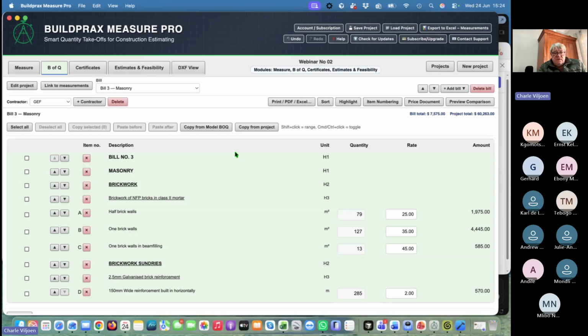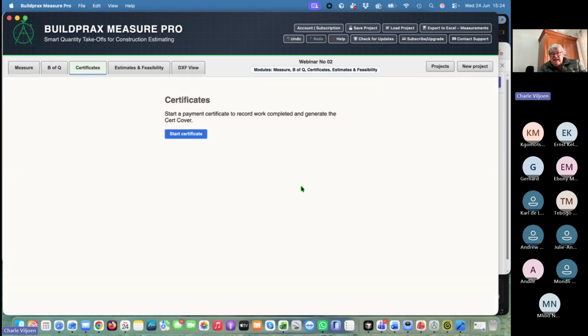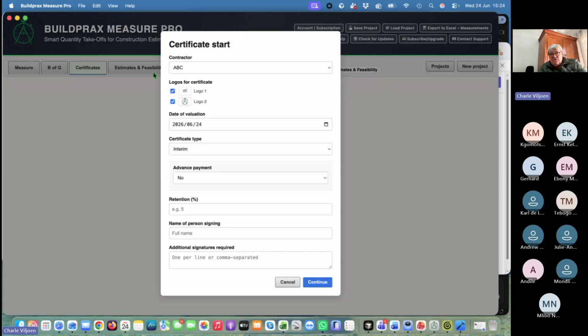So let's say, all right, contractor ABC, we will move him and say ABC, and the ABC contractor's rates will be appearing here. So now it has been signed, the contract's done, the guy is now going into the tender, and we need to get him to work. So the next thing is certificates, and so I will tick to my certificates there, and we will start the certificate. The very first certificate, you have to choose your contractor, and obviously you can't change contractors in certificates and their rates, so you will include that.